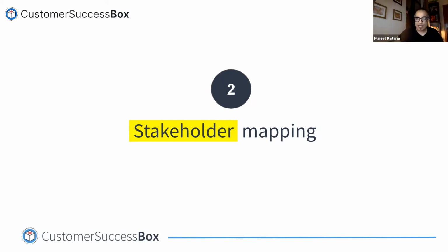So one of the pieces that we do is we understand who's the sponsor, who's going to be the SPOC for onboarding, who's that one individual, and make sure you never accept too many SPOCs. Hopefully we'll touch upon that later. A SPOC has to be a single point of contact. Underline that single. A lot of times you're going to be given multiple SPOCs.